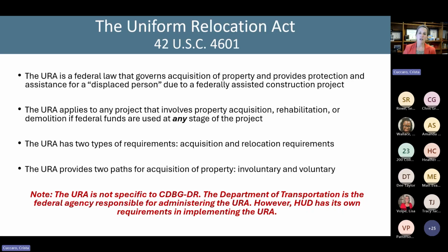I've got a note here: the URA is actually not specific just to CDBG-DR, like the other two requirements that we're going to talk about. The Department of Transportation is the administering federal agency for the URA, but HUD has a few of its own requirements in implementing the URA. One of them is specific to notice, and I'll touch on that in just a moment.